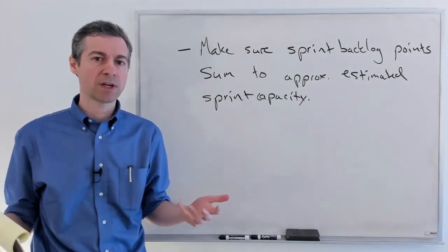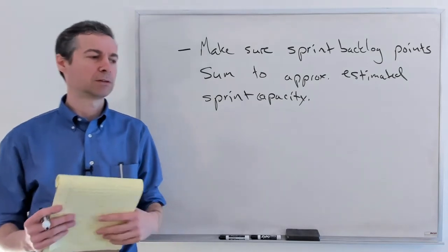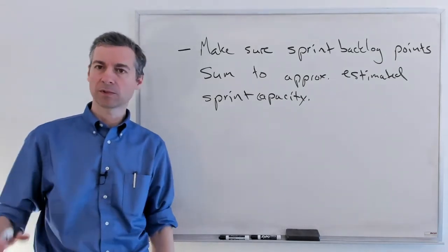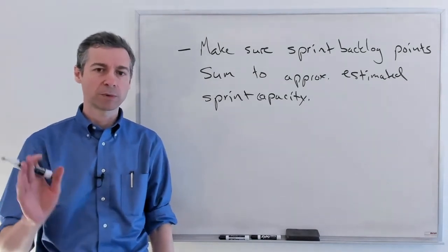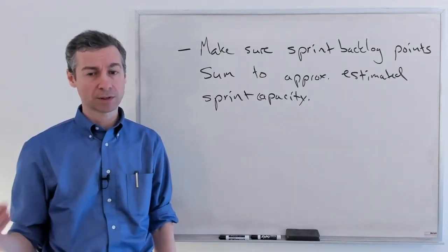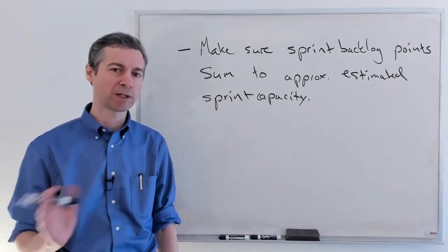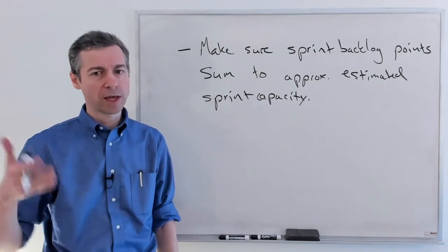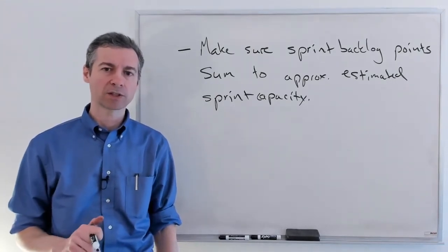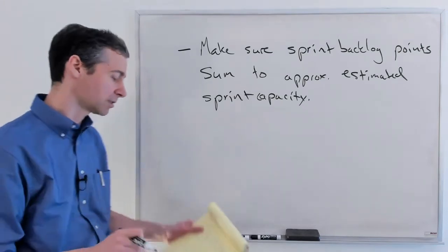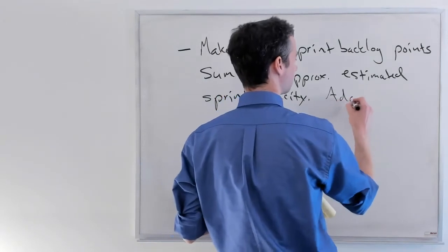Instead, if a team finds, wow, we got all the stories done with time to spare, then that's when you say to yourself, we need to increase our capacity because we're actually finishing early. So we should go ahead and take on some more stuff and make sure that we are calculating an accurate velocity. So add or remove stories.